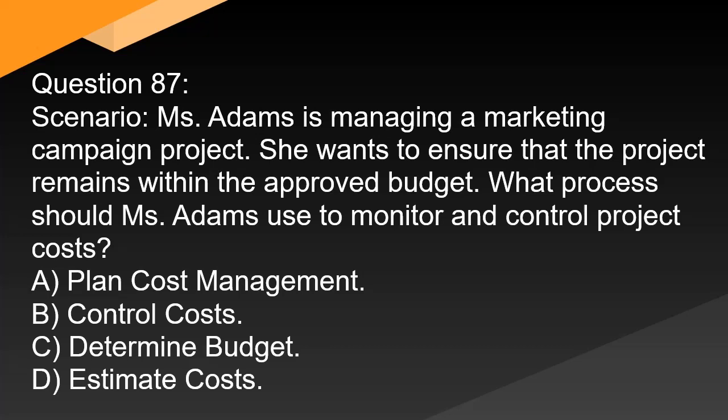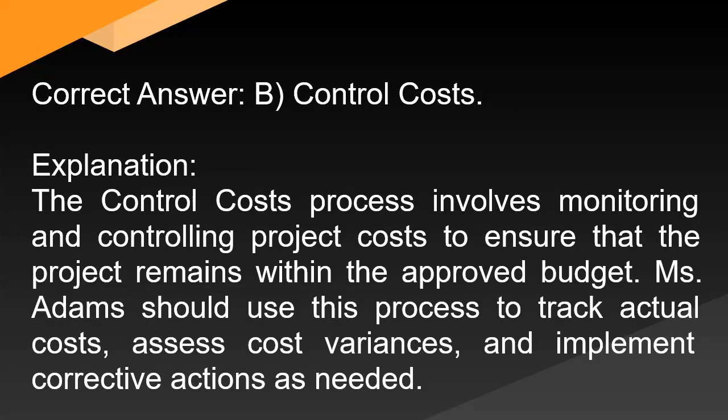Question 87: Ms. Adams is managing a marketing campaign project. She wants to ensure that the project remains within the approved budget. What process should Ms. Adams use to monitor and control project costs? A. Plan cost management. B. Control costs. C. Determine budget. D. Estimate costs. Correct answer: B. Control costs. Explanation: The control costs process involves monitoring and controlling project costs to ensure the project remains within the approved budget. Ms. Adams should use this process to track actual costs, assess cost variances, and implement corrective actions as needed.